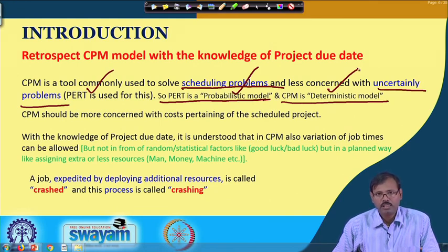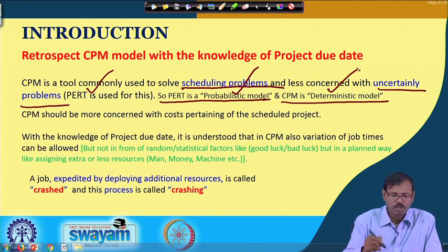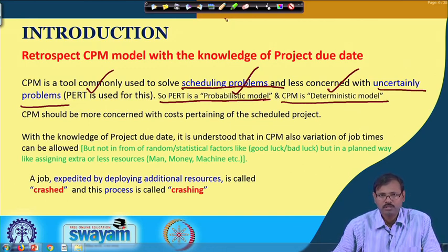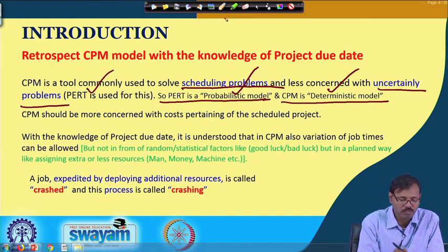But we have seen in our earlier classes that we have considered a due date which differs from the target date or the earliest possible time of completion. In those cases, we try to reschedule, considering that some jobs have negative slacks, but some can be rescheduled by reducing their available slacks. That means, in the critical path method of analysis also, we have some possibilities where we can handle some level of uncertainty.